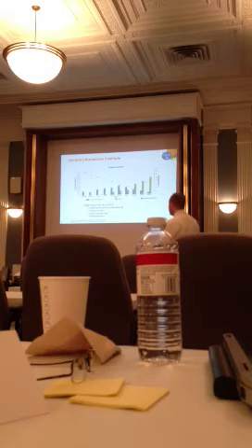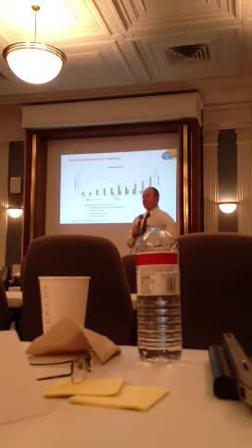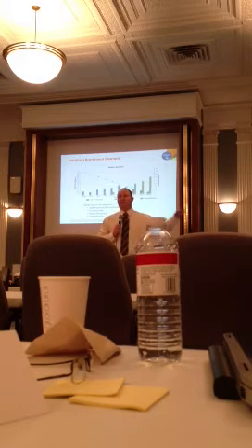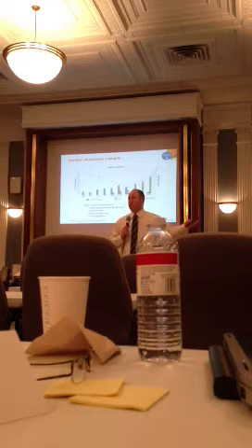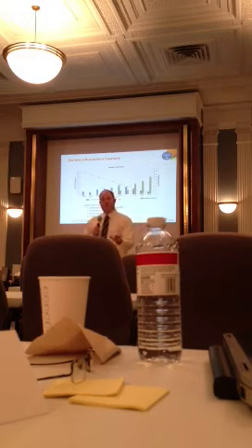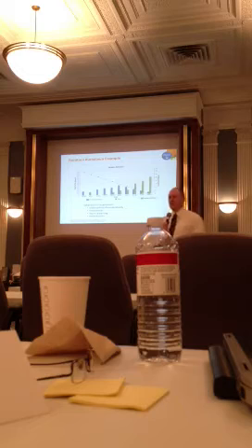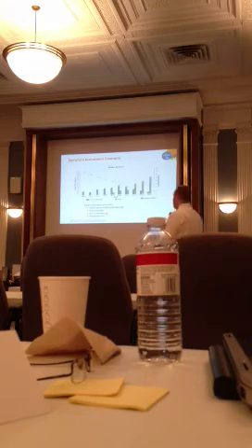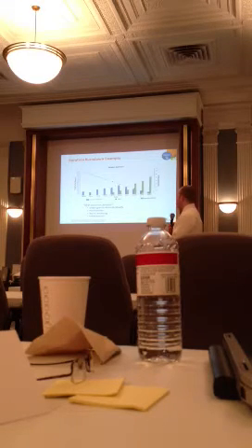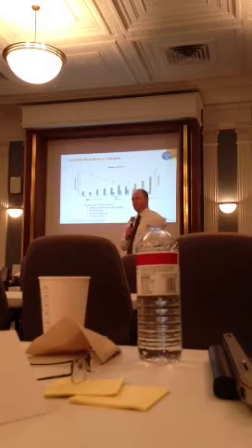All right, this blue bar. It's task hours left to do. So if on Wednesday I've already worked 4 hours out of the 8 that I thought it was going to take to do this task, the task hours left to do is now 4, right? On this other y-axis, we have the number of story points delivered, and those are the green bars. Each bar here, or set of bars, is a day. And this whole chart represents one iteration. Okay?